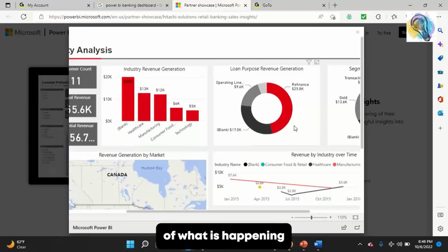And even in terms of what's happening in the middle tier and back end, right? As long as it's minor, we will not do it in the same sprint. We'll do it in the next sprint, which we'll discuss. So we'll be able to accommodate the change request in the same release, but we will not be able to accommodate the change request in the same sprint. And we'll go into this concept.